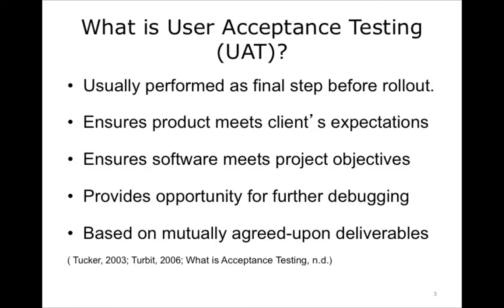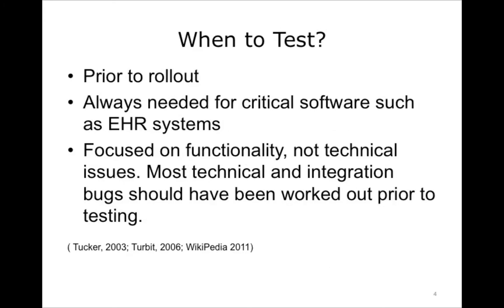Early on in the project plan, a list of baseline requirements should have been generated and mutually agreed upon by your organization and the vendor as must-haves for your software implementation to be considered successful. Your testing strategy should be based, at least in part, on validation of these requirements. UAT is usually the final step before the general rollout process begins, and the software product should be fully completed. Because of the critical nature of health record systems, UAT should always be completed before initial rollout or any upgrade to the system.